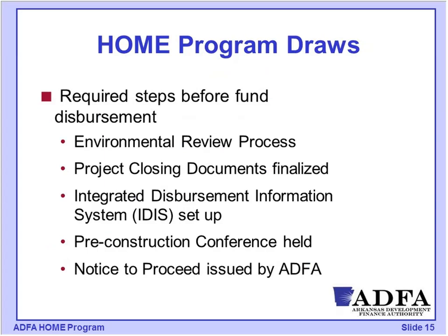It's been fully executed. There is a standard setup form for IDIS, the Integrated Disbursement Information System, that you would be completing and submitting to ADFA. That gives them all the information about the project that's needed, so they're able to go into the IDIS system, set up that project, commit the money to that project, and have it set up so that once the project needs to draw money, it's already been identified in the system and is essentially ready to roll.